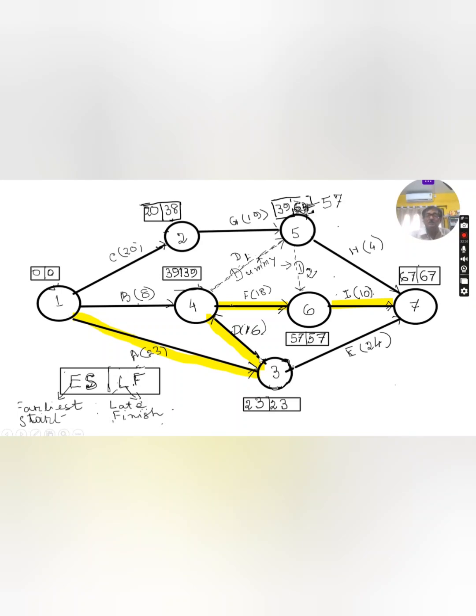So these are the critical activities, and you can see the earliest start time and latest finish time are the same: 23, 23, 39, 39, and this is also 57. This is the critical path. And what is the minimum time to complete the project? That means you have to complete all the activities. That is 67 days.